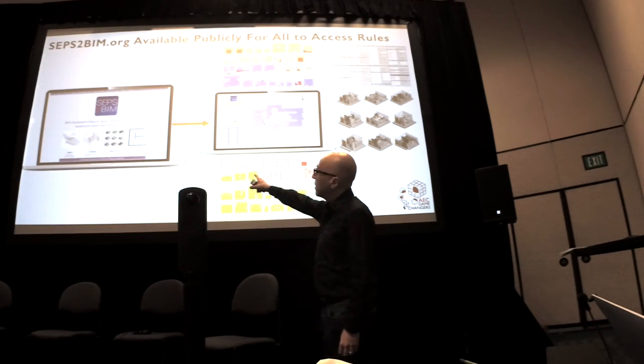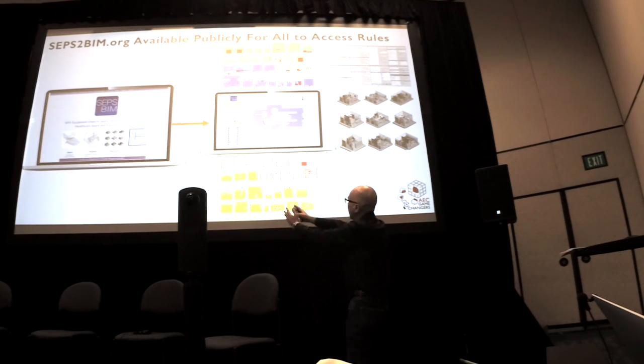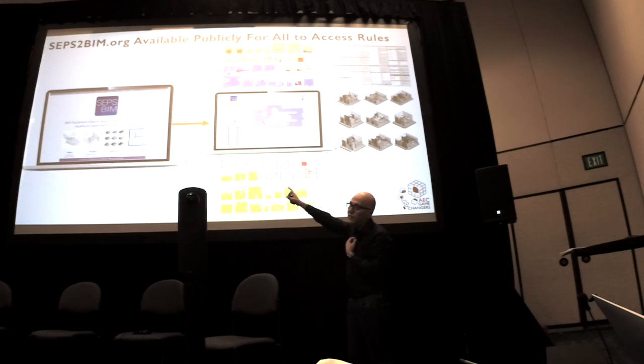This output that comes out here is on contract day, saying this is your contract to design this. That gets saved as a snapshot of your requirement. They might still continue, they will continue to update in the future, but this is your project that you're working with. And that's saved in the database saying on this date, you are contracted to do this, so that they no longer change things.